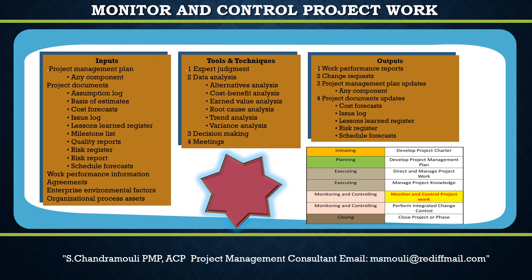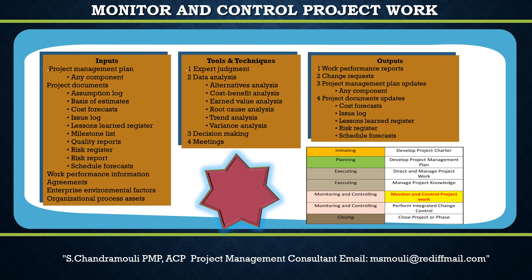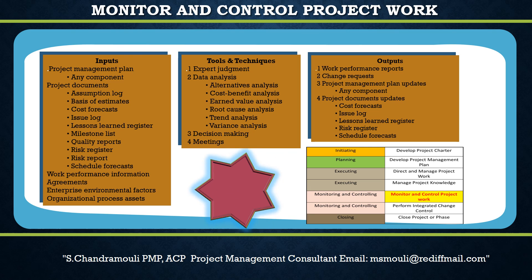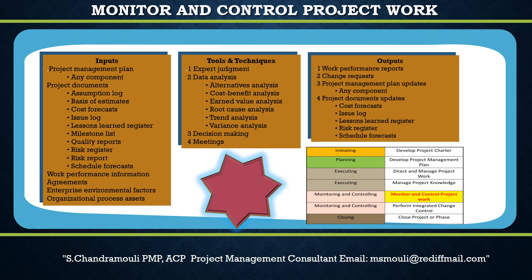The next input is Organizational Process Assets. Organizational process assets may include but are not limited to: organizational communication requirements; financial control procedures (e.g., time reporting, required expenditure and disbursement reviews, accounting codes, and standard contract provisions); issue and defect management procedures defining issue and defect controls, identification and resolution, and action item tracking; and change control procedures.